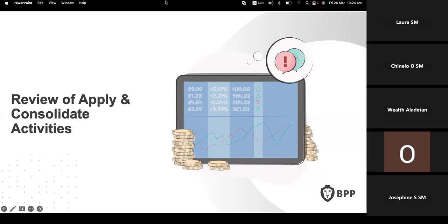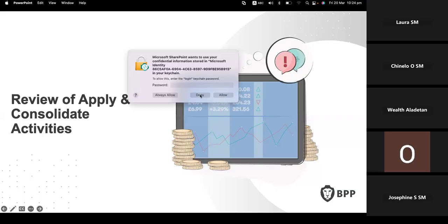Yes, I get your point. Perfect. What we did was what we call ad hoc refinement. I thought it was ad hoc sprint planning. Laura, refinement is for new PBIs for the next sprint, not for the current one.